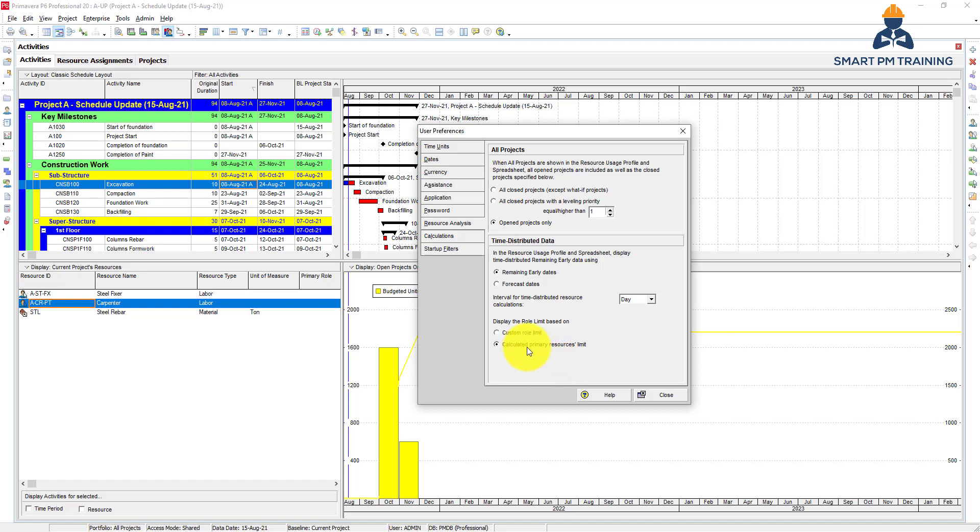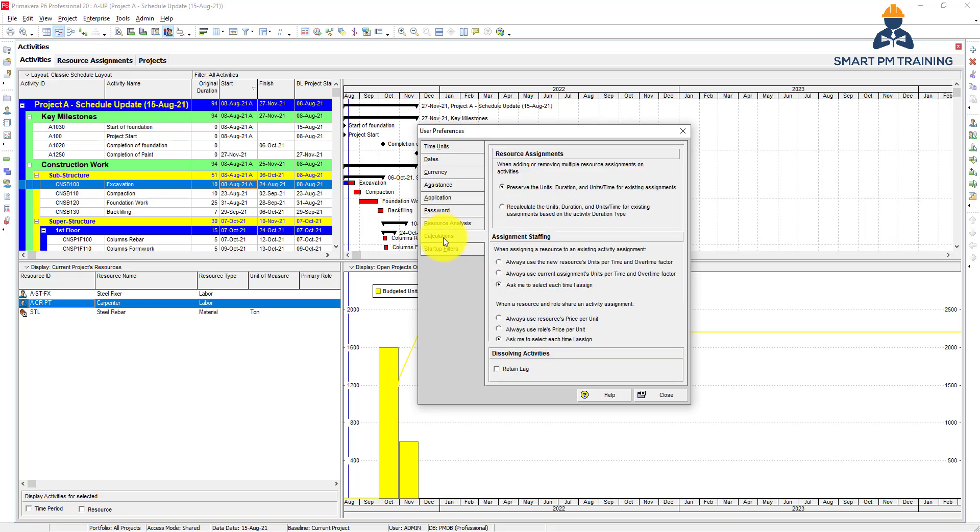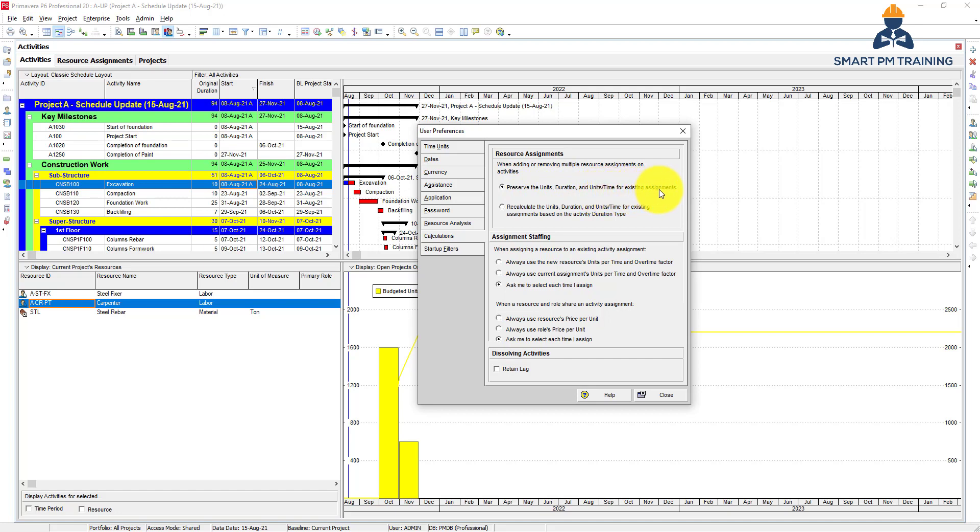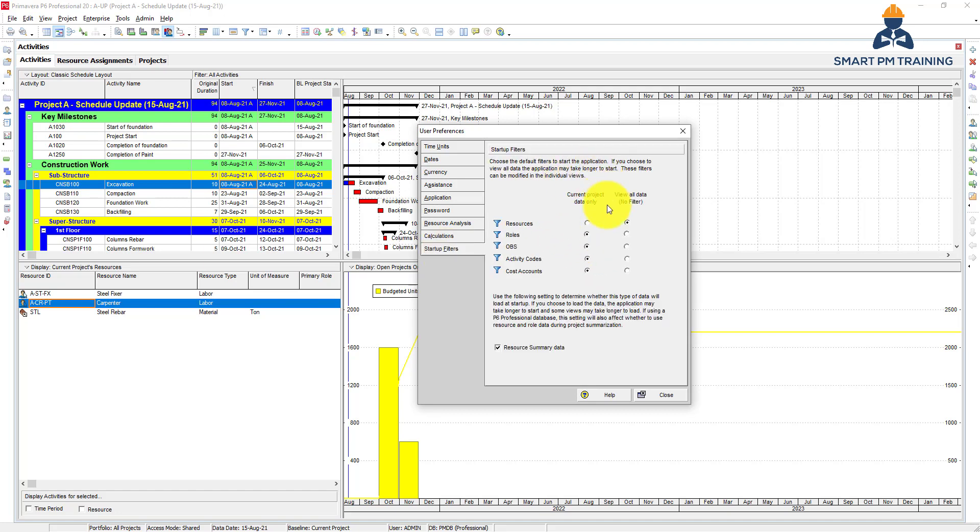And for the calculations tab, we actually talked about it. We explained it in a previous tutorial. And I explained why it's important to always preserve the units, duration, and units per time for existing assignments, not recalculate, because we want to have the duration and units independent from each other. So if I make changes to units, it should not affect the duration and vice versa.